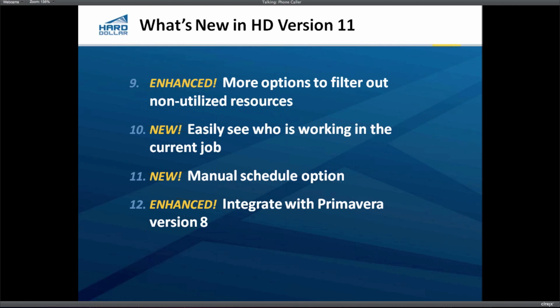You'll see when we import period quantities. Remember we talked about maybe it's a 40-year job where we want to bring in quantities by month. That essentially defines the schedule for us if we do that, because we know how much work is going to happen in each period, right? So we can drive the schedule from that. It's a manual schedule because we're not using Project or Primavera, but it's really developed automatically in that case from the period quantities. So a lot more options now on scheduling.